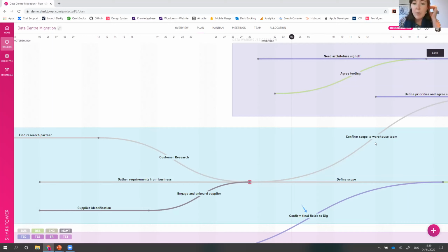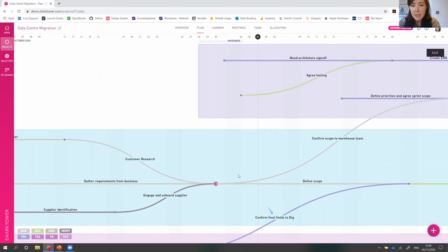What's the status? And if we haven't already worked that out before the meeting, then I would expect that, right, Neil, can you raise an action for me? I'm going to work out whether or not there is a knock-on impact to this scope definition and this activity here, or whether we can shorten those activities. So again, just trying to preempt what's coming up here, because we need to start these pieces of work as soon as possible, because they've got knock-on impacts further down the line. So thank you for now assigning that task.